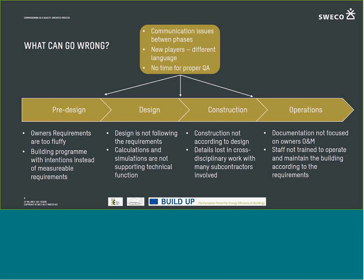Again, many of these parties that are actually involved in the construction change during the phase shifts. And the commissioning process actually goes from the pre-design phase all the way through to operations. And that means that we could help close gaps when the phases shift.